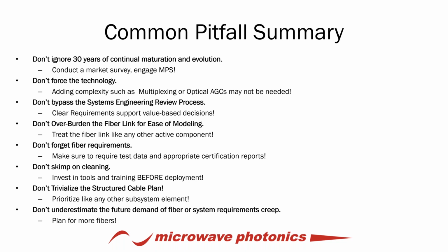Multiplexing may not be the right strategy just because you can take multiple optical channels and multiplex them down onto a single fiber. There are compelling reasons for cost and complexity to say, well, you're better to use discrete fibers for each one of those. Don't bypass the systems engineering review process. The systems engineering review process helps make value-based decisions. It makes it much easier for us to engage with you, or for you to engage with any of the potential suppliers in the market segments on what you want, and allows for consultative engineering type processes to occur.